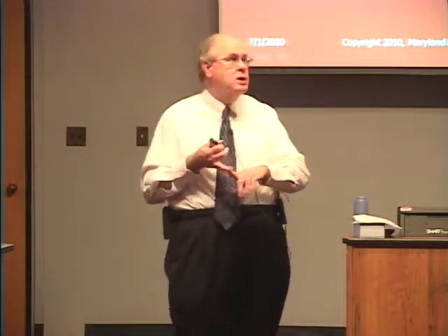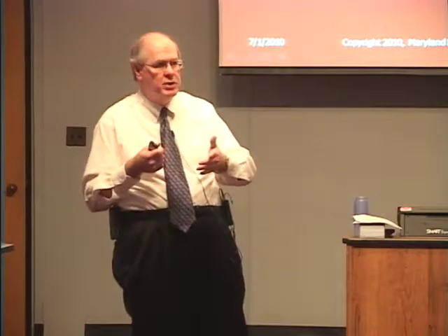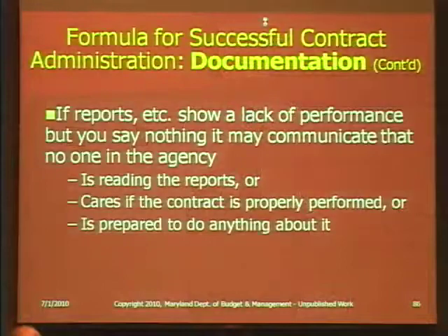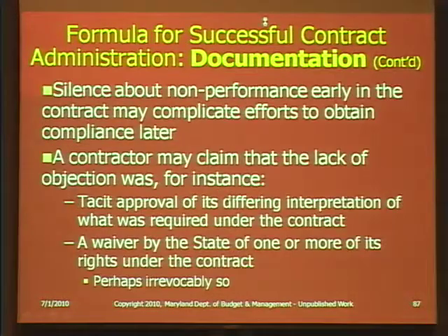Well, then you don't need a report if no one has a purpose for it or no one looks at it. Just because they're giving you something, if no one is actively looking at these things, it doesn't make any difference. And if no one comes back to them and says anything about their reports, it's the same as letting them get away with non-performance. So it may mean no one reads the reports, no one cares, no one is prepared to do anything about it. And I will tell you something very shortly about a situation of no one being prepared to do anything about it. Silence about non-performance early in the contract may complicate efforts to obtain compliance later.